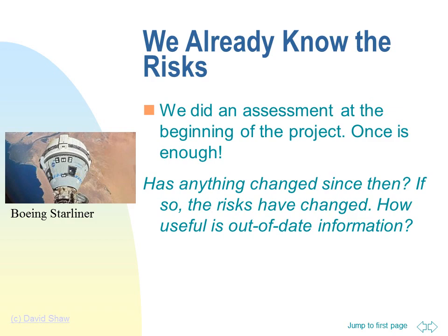Generally, most project risks will change in the area of dependencies and assumptions. Dependencies are subject to change that might be outside our control. Assumptions can turn out to be false. In agile projects, risks can change in constraints on cost and schedule.